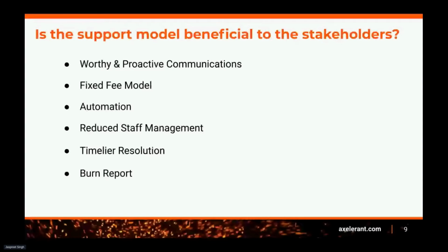Burn reports are a very crucial thing which we are already maintaining within the Excel. When we set the burn report, it will show you the consumption report. Let's suppose there's one ticket whose estimation was around 10 hours and the team consumed 20 hours to fix that, but we committed 10 hours to the client. In the burn report sheet, it will show that only the 10 hours will be charged to the client, and the other 10 hours will be considered non-billable hours. That is the difference we maintain under the burn reports, actual versus committed values, and the proper monthly report will be shared with the client as well.